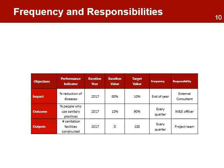The last column of the performance measurement framework includes information on the frequency of the data collected for each indicator and the person or groups responsible for collecting and reporting on the data. The performance measurement framework is used during all phases of the project: implementing, monitoring, evaluating, learning, adapting, and even re-planning.